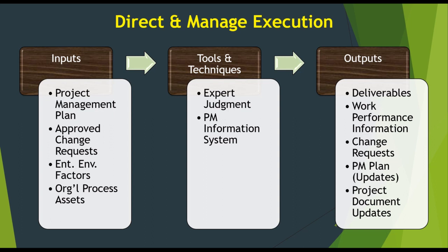There are a lot of essential things that are taken care of during the execution phase. The inputs during the execution phase are: project management plan (PMP), approved change requests, enterprise environmental factors, organizational process assets. Tools and techniques used are expert judgment and project management information system. The outputs are deliverables, work performance information, request for change, updates to the project management plan, and project document updates.